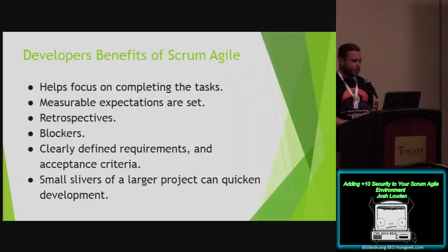Requirements and acceptance criteria are clearly defined before each task is actually started. The acceptance criteria can even be adjusted as needed, but only if time allows on the task itself. This limits scope creep of a particular item, so if a developer is adjusting the login page, you have a set of criteria and it's not going to blow up into a huge project.